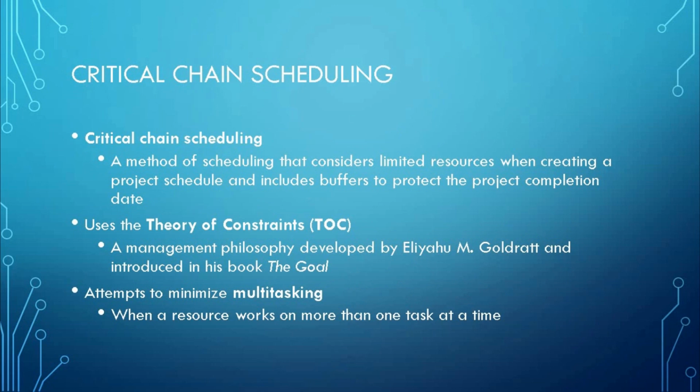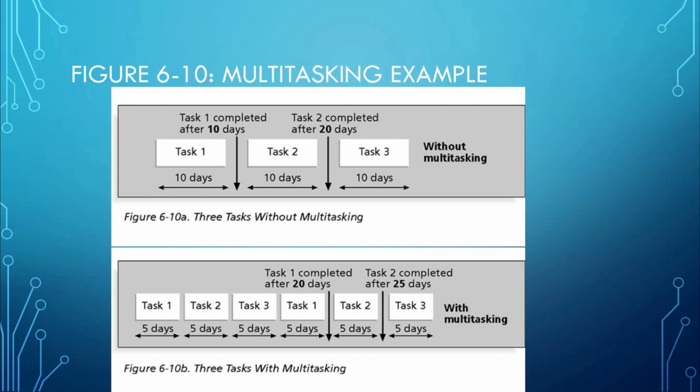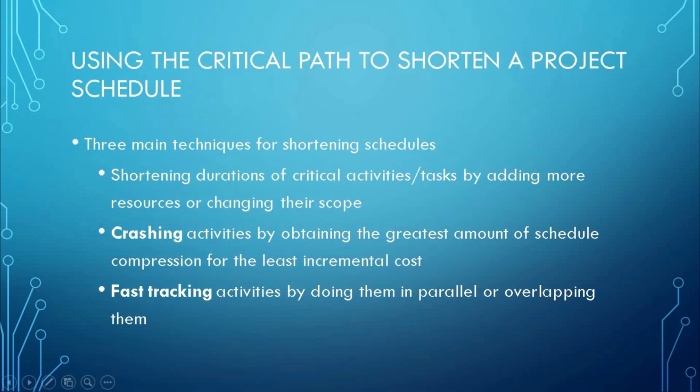Critical chain scheduling. Critical chain scheduling enables you to identify and focus on the shortest path of sequential activities in a project. Manage schedule variation at the global level rather than at task or activity level. As you can see on the screen, multitasking is less efficient than doing tasks one at a time, because one at a time helps to finish the activities as soon as possible.